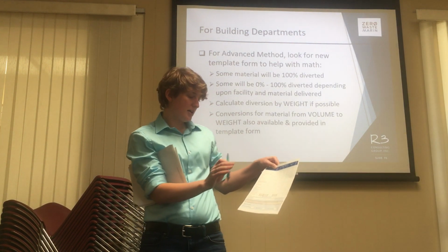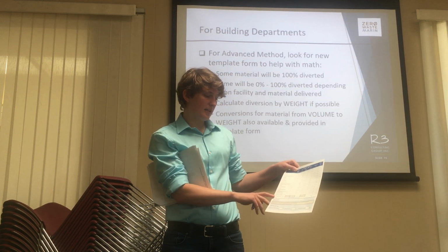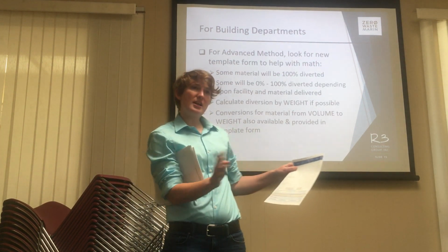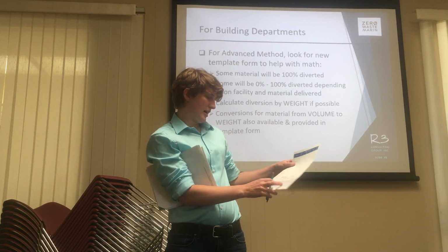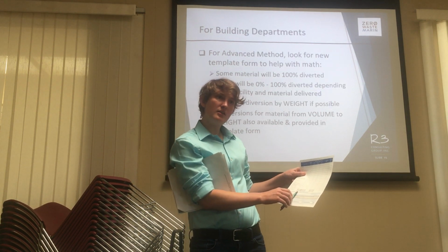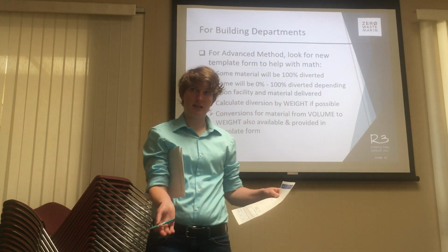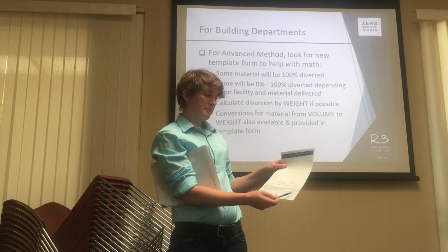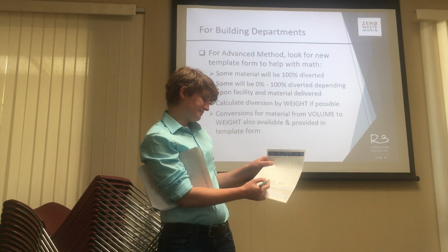The exception here is that in some cases, probably in many cases, they're going to be delivering material as mixed C&D debris. This is the most complicated part. We're trying to make it as easy as possible, but essentially the contractor is going to need to fill out the diversion rate for that facility. That's essentially going to be a question asked of the facility at this point. So if it's 65%, for example, or if Marin Resource Recovery is 75%, you fill that in under A.